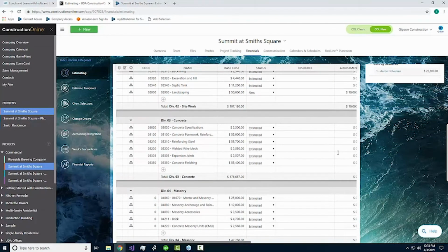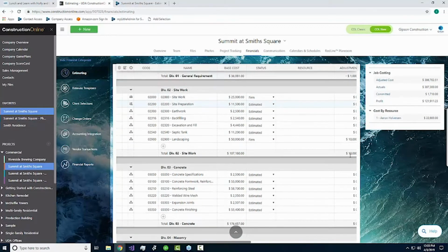That way you know what adjustments you need to make on your next estimate. If you're changing the base cost once you're finished putting together the estimate, you're going to lose out on so much valuable information, like what we need to change, or what we need to take into consideration to really hit our targets moving forward.